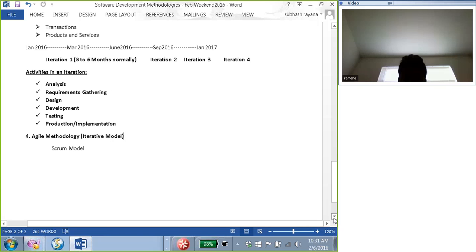Because of some reason, maybe the business users were not available, or there was a funding issue, the project funds were not approved. This is a red flag for the technology team, because they don't have money, so they're not hiring people. All of this is discussed in the meeting, and the goal is to bring all the items, especially when the project status is red, to a resolution as soon as possible.